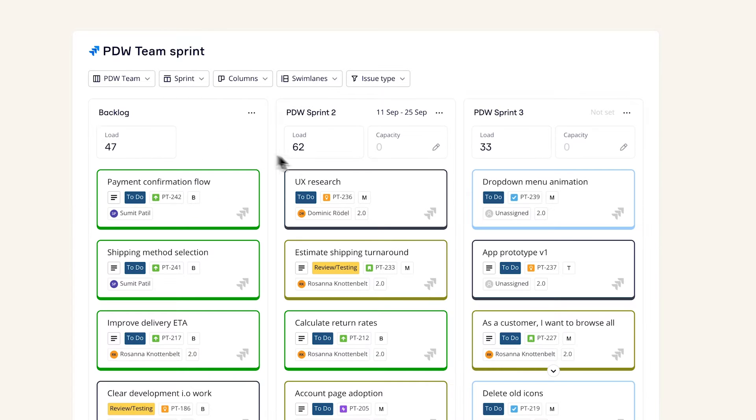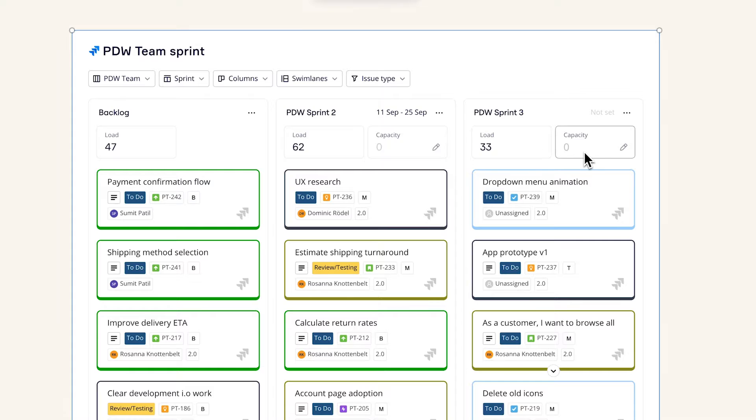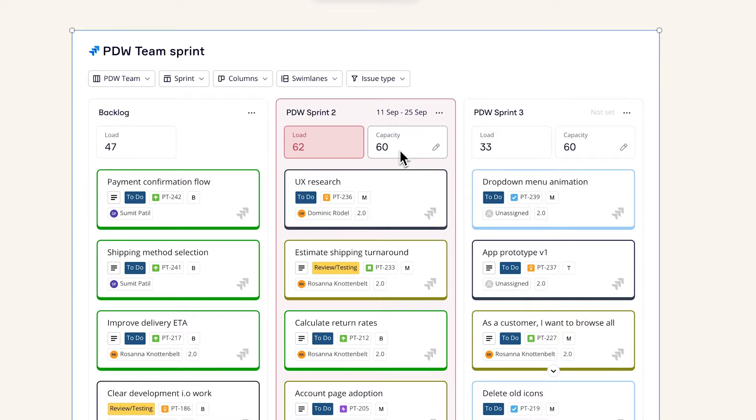Estimated story points are pulled directly from JIRA and totaled. Enter in your team's capacity. If load is more than capacity, it will be highlighted in red.